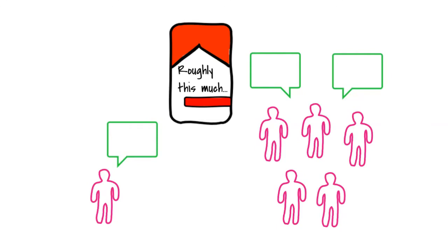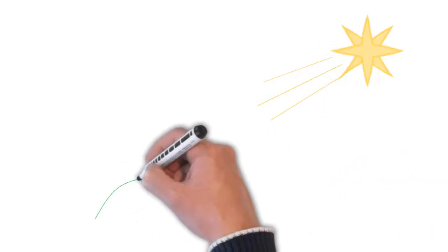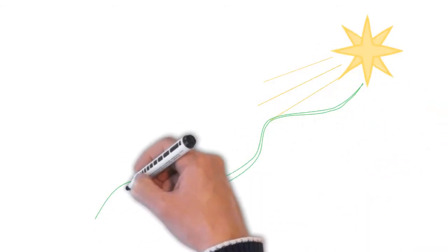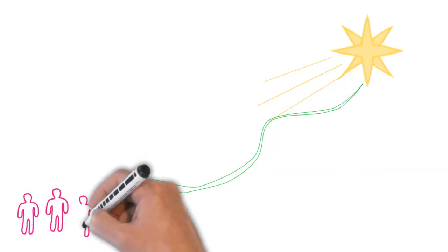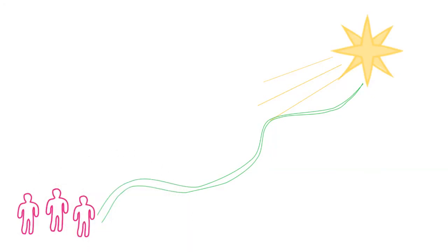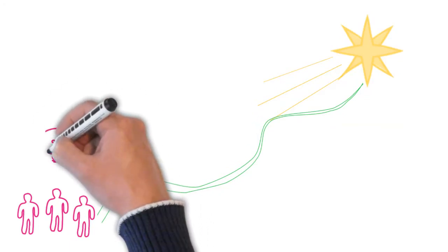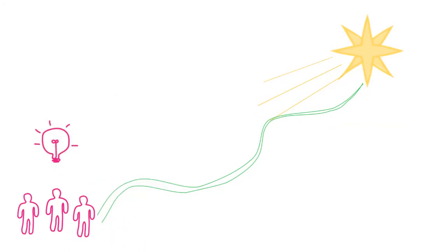But what's important is that before coming into the session, they think about their capacity. Otherwise, all of this stuff is academic. Once they've agreed how much work can be done, it's time to agree a sprint goal with the product owner. This is the outcome the team will have achieved if they're able to deliver the items in the backlog that have been prioritised for the sprint. Coming back to the frontline example, the sprint goal could be something like, we will have understood the needs of service users who ask for our help.